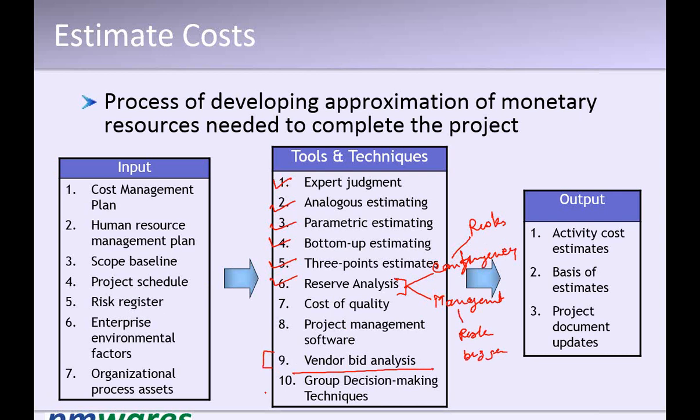If more than one person is available for this work, which is normally the case, then effective decision making techniques are important. Using any of these estimates, you come out with the cost estimate of each activity. You know for each activity what kind of resources and how much quantity are required. That helps you understand what the cost of the activity should be.